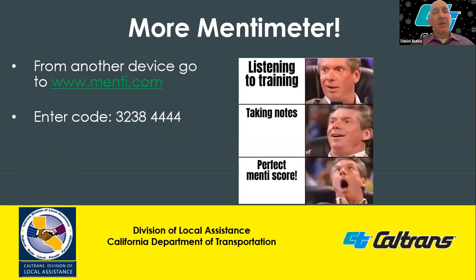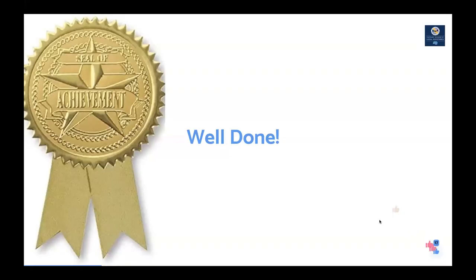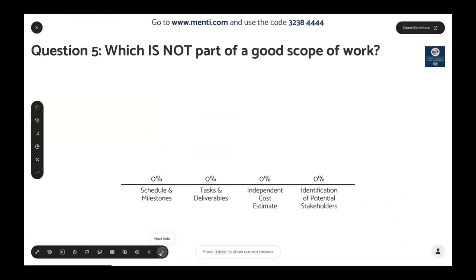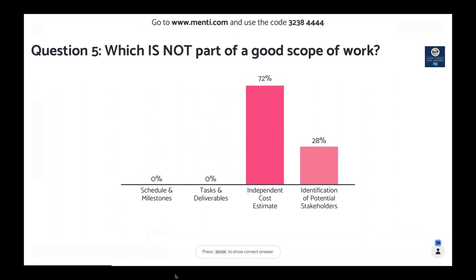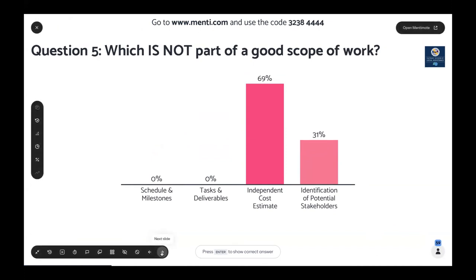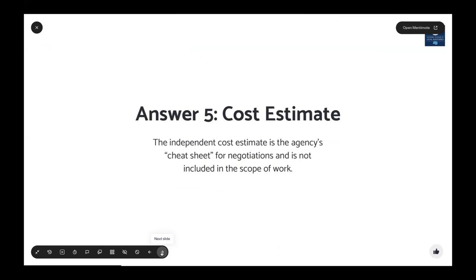Mentimeter question five: which is not part of a good scope of work? Choices are scheduling milestones, tasks and deliverables, independent cost estimate, or identification of potential stakeholders. The correct answer is independent cost estimate. The independent cost estimate is the agency's cheat sheet for negotiations and is not included in the scope of work. The consultant has already submitted their cost estimate or bid package before negotiations occur, so it is not included within the scope of work.